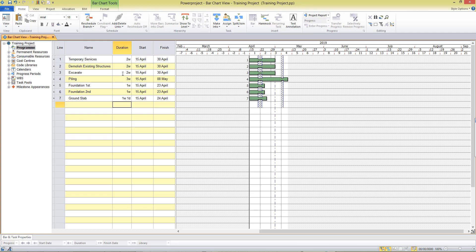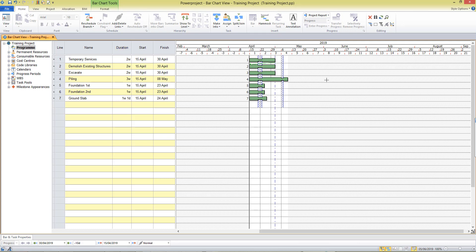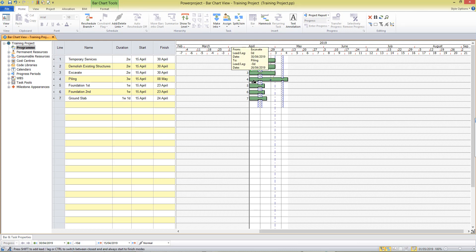Once we've entered our tasks we now have to consider the logic, the relationships between them. In Power Project we can draw our links simply by placing our cursor at the end of a task and we see our finish link cursor there. Pulling away from the task I'm starting to draw a link and I can take that to the start of the successor task, putting in a finish to start relationship between those two tasks. We position our cursor and click and drag to draw the link to the next task in our project.